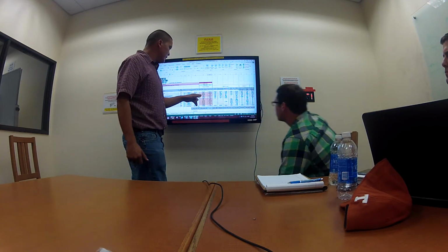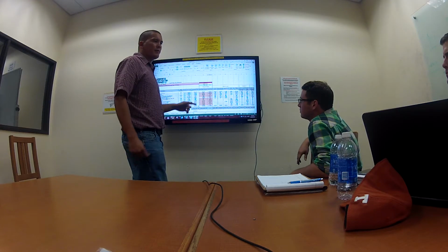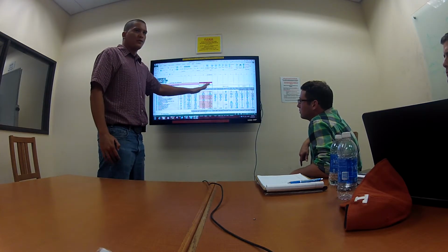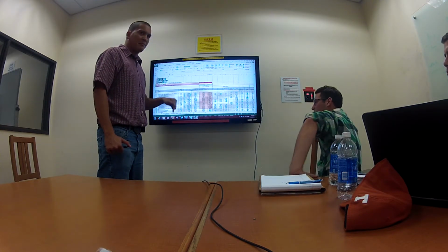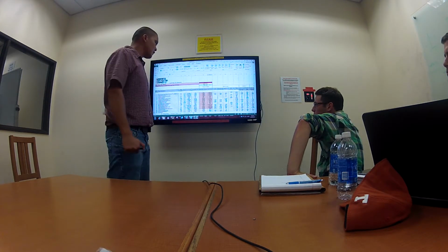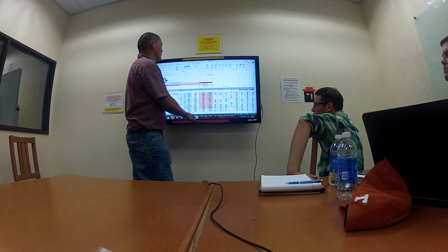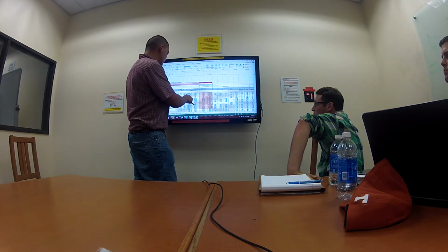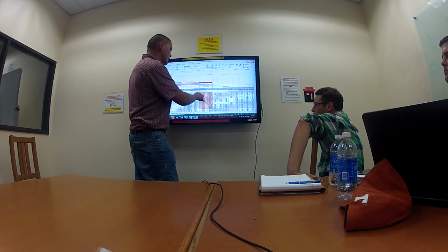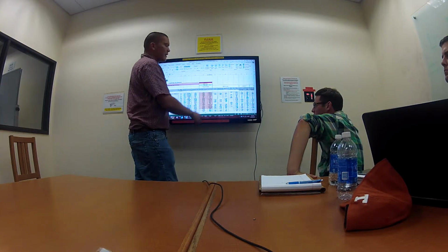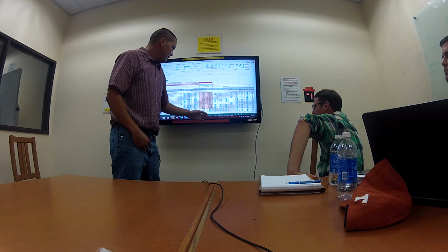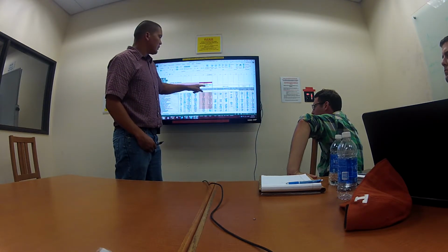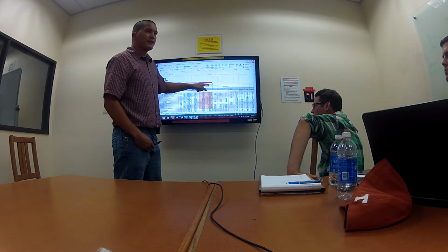What it'll be is these numbers don't have to be the same. This right here is where you choose how you want to make them. If you want to make them round numbers, if you want to bid them up, if you want to bid them down, this is where it would be. So we were saying, hey, fiber rolls, we're always going to overrun in fiber rolls, even though it says it costs us $9,000 a piece. I'm going to make those $7,000 a piece. And then you go through and find ones that are going to underrun, and you can write those down. And then you're trying to get your bid total down to 0.